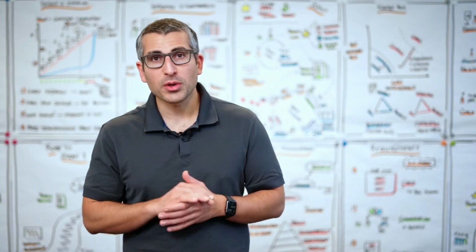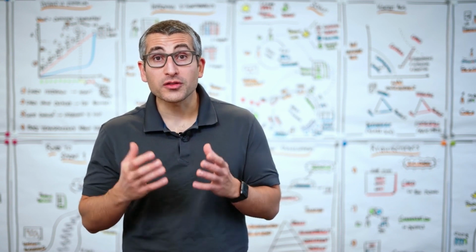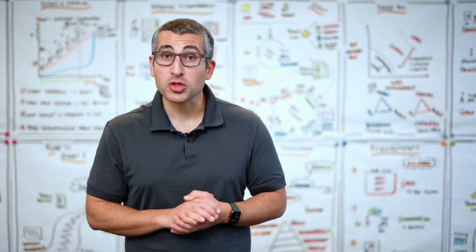Question number 1, what did we achieve yesterday with regards to our sprint goal? Question number 2, what are we going to work on today in order to achieve our sprint goal? And last but not least, question number 3, are there any impediments that keep us from achieving our sprint goal? If we do identify impediments, the intention is not to solve them right in the sprint planning, but to take that impediment and discuss it after sprint planning with everyone that can help remove that impediment.